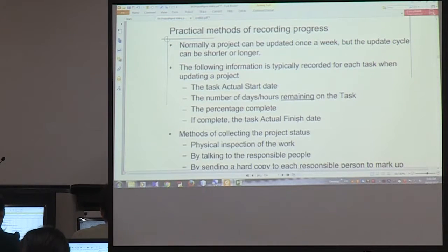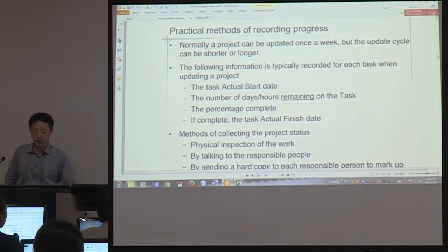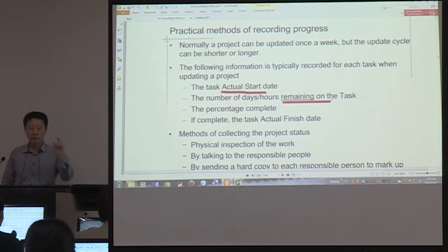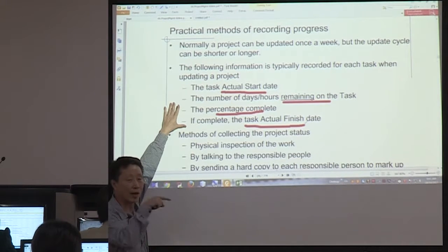To track the progress of the project, this is the usual data you gather from your team members. Usually you get task start date, remaining hours per activity, percentage complete, and if it is completed, the actual finish date. Based on this information, you can enter those data into your plan.